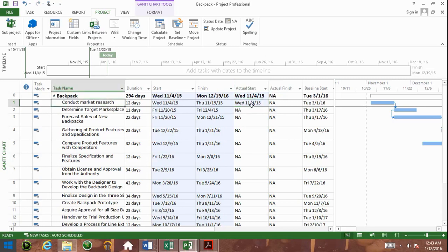So you can see selecting the start date shows my task has started. If you have tasks that are meant to have started and they haven't, this is where you, the PM, need to control schedule. This is where you need to ask the questions. Hey, resource X or Y or resource Z, why have you not done what you should have done? Why haven't you done what you should have done by this date?